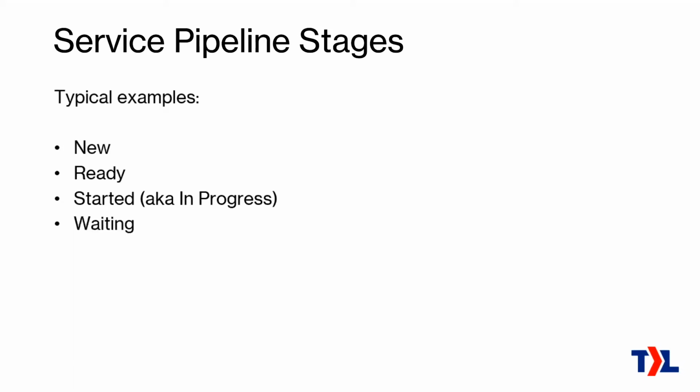The waiting is another one. That has to do with things where the next step on that ticket is something outside of the team. Most commonly, you're waiting on the customer for some information or for them to do something. It could also be waiting on a vendor. It could be waiting on parts in the mail as well.